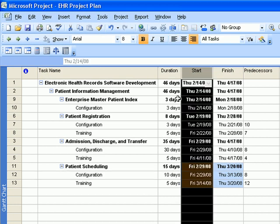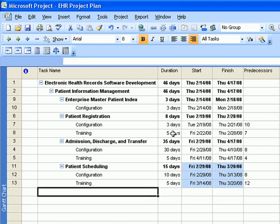Your tasks are now chronologically ordered by start date. Under the Duration heading you'll see the total project duration — according to our project plan it will take 46 days to accomplish all of these tasks. The project finish date will be April 17, 2008, if you started your project on February 14, 2008.